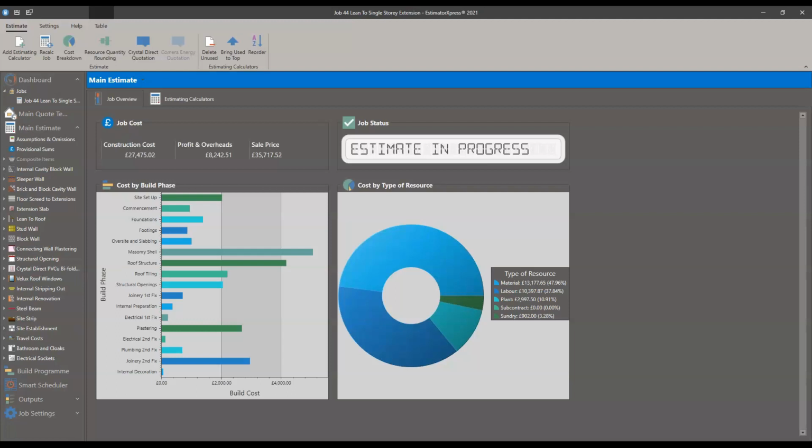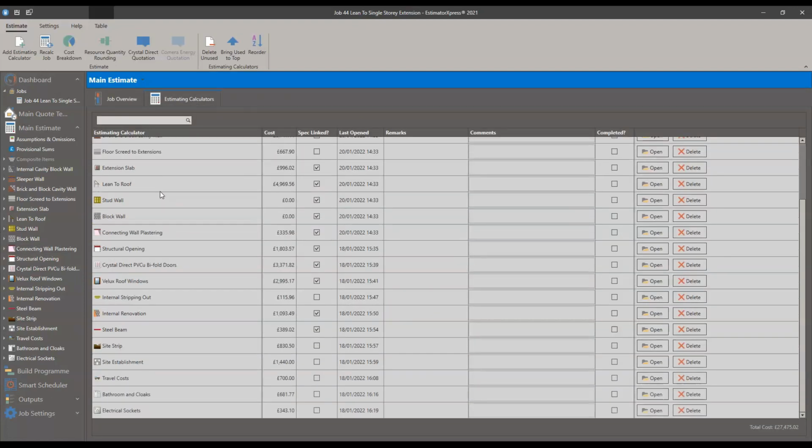It's very top down. The information literally flows from the top of this list down. Hence why it goes from, say, the quote template down to the outputs, which then affect the build program, which then affects the outputs. So template feeds estimate, because the template is effectively a front end for the main estimate. It's a human interaction interface to make things easier for people, other than diving straight into the estimating calculator as a list like this, which isn't the most natural way of going about it.